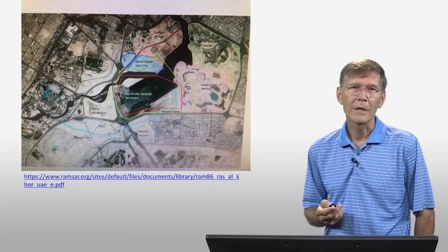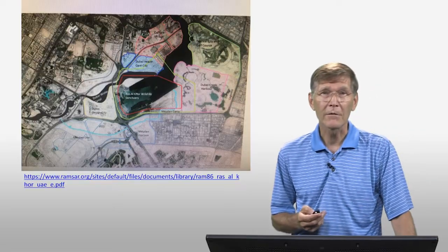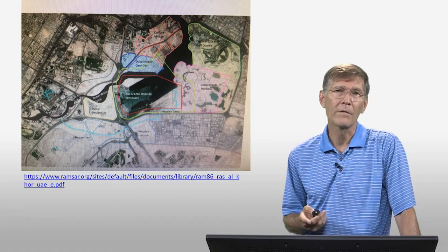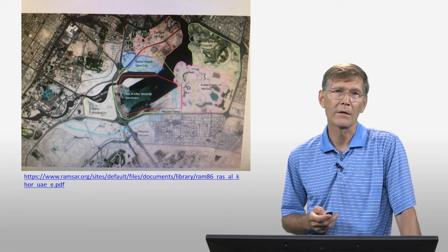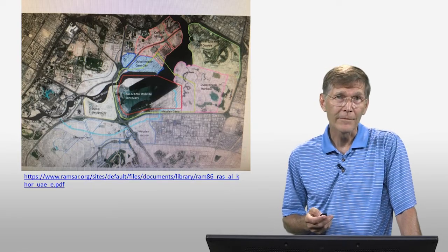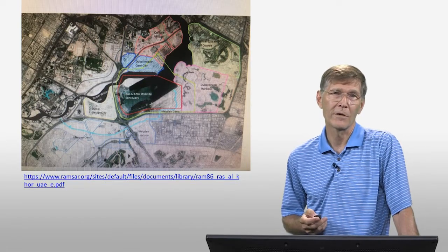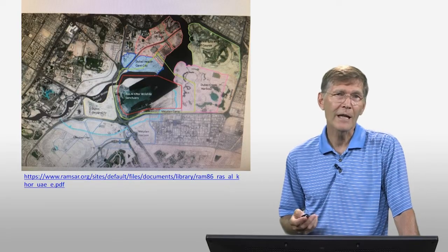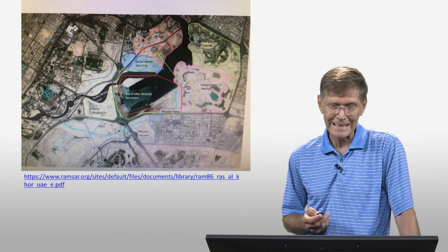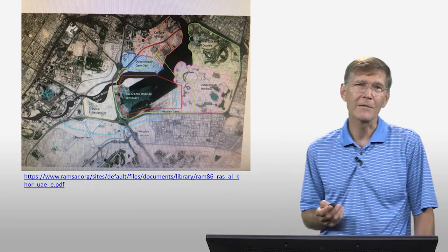And so now let me get to the crux of this case study. So in this picture here, you can see right in the center is the wildlife sanctuary. And originally, the boundary of the wildlife sanctuary is the red line that goes around that wildlife sanctuary. And the developers wanted to develop right up to that red line, okay? And the environmentalists were having a hissy fit that it needed some kind of a buffer zone around it. And Ramsar sites generally have buffer zones around them. So there's a clear precedent that some kind of a buffer zone was probably needed in this site. And they were arguing back and forth because every foot that you take away from the developers is millions of dollars.